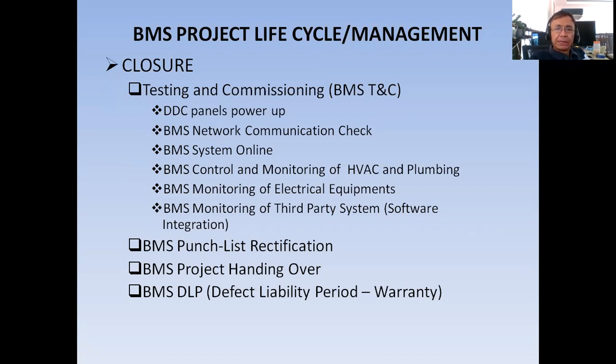Once the system is online, you can start one by one the control and monitoring of HVAC and plumbing equipment. You check first if you can control and monitor the real-time status of HVAC equipment.